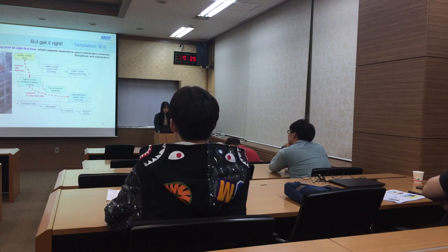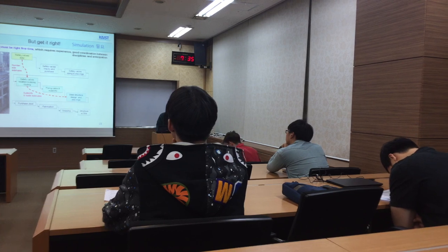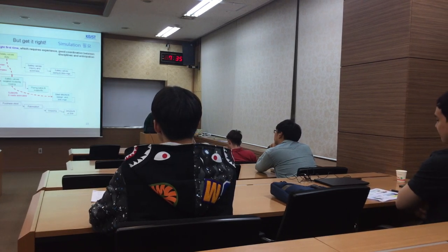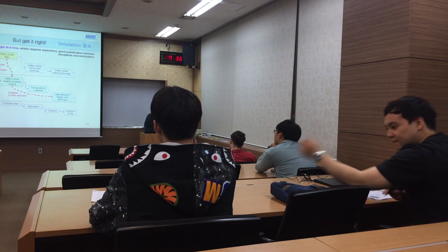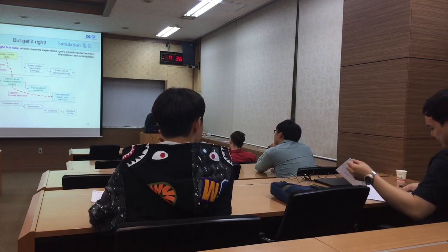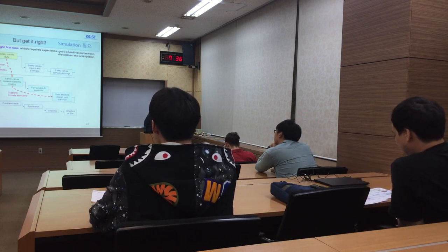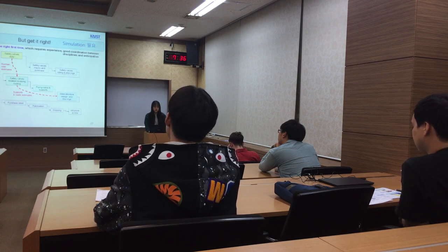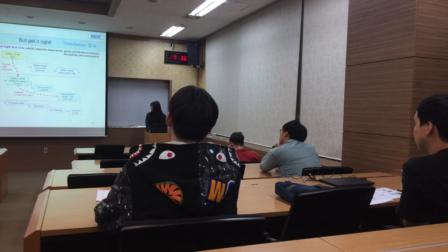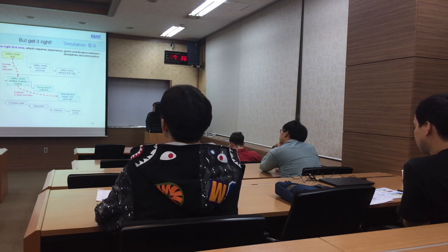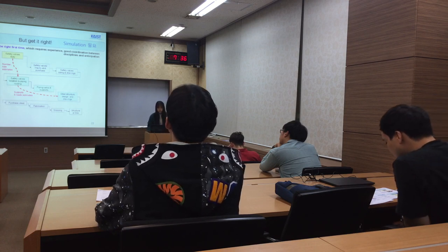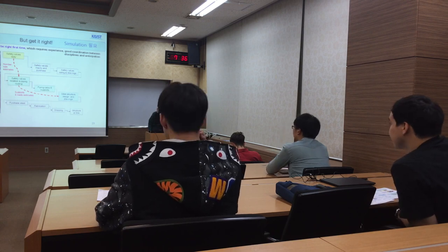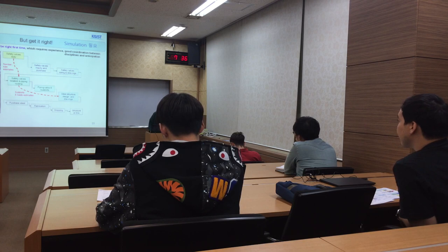Engineering must be right the first time, which requires experience, good coordination between disciplines, and anticipation. So in the diagram, we want to make some safety valve. We have to estimate the number, size, supporting loads, and many other specifications. If we fail to estimate this the first time, then the cost and time will be critical, the time will be delayed, and the additional cost will be much more than if we had been correct the first time. So we need to estimate correctly the first time.